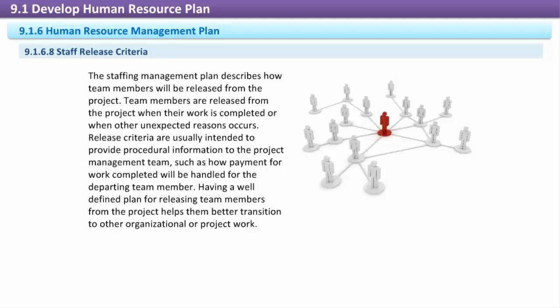Staff Release Criteria: The staffing management plan describes how team members will be released from the project. Team members are released from the project when their work is completed or when other unexpected reasons occur. Release criteria are usually intended to provide procedural information to the project management team, such as how payment for work completed will be handled for the departing team member. Having a well-defined plan for releasing team members from the project helps them better transition to other organizational or project work.